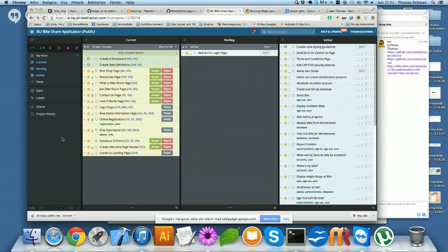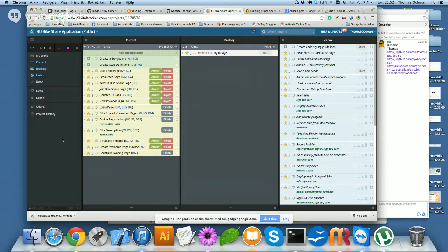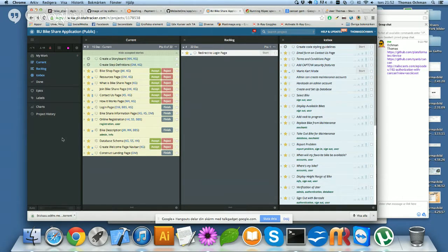And if you deem that a story is a 4 or 5-point story, after discussing it, so that there are several models or several controllers that need to be created, and a lot of views on the presentation layer, then what you have to do is split it out into separate stories, because you only go up to 3 points, right?